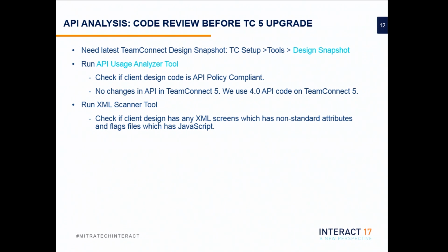As a part of the TeamConnect upgrade project, there will be some mock upgrade process, and some development time where you have to fix integration code. So you can include fixing your non-compliant class files as a part of your development process. That's why it is important to run this at the start of the project.